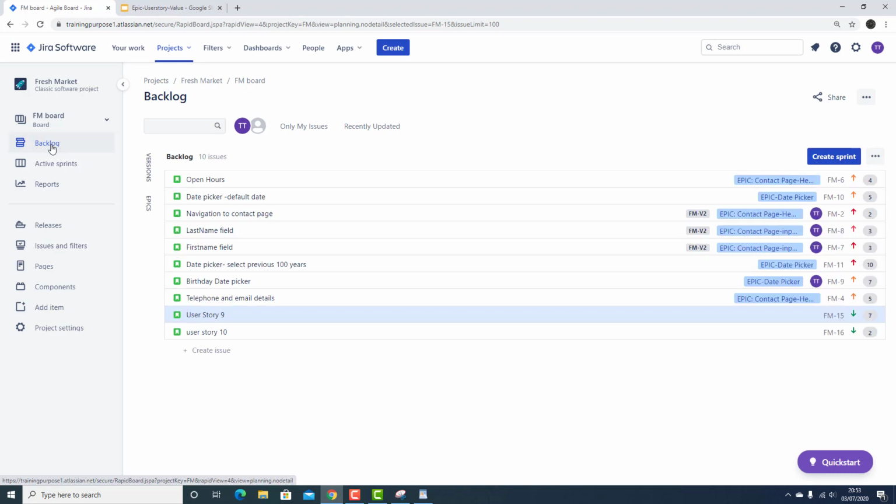Okay, the moment you click on the backlogs, you will see all the user stories for which you have assigned the priorities, and as well as defined the acceptance criteria in the backlog refinement process. Alright, so now we have 10 issues in the backlog. We need to decide how many issues or user stories we are going to complete in our sprint. Let's say we are having a release in 2 weeks of time, and for us each sprint is 1 week of time.